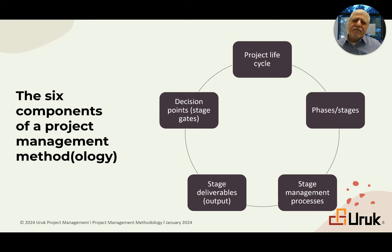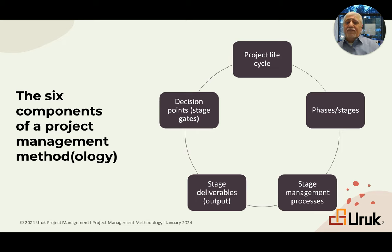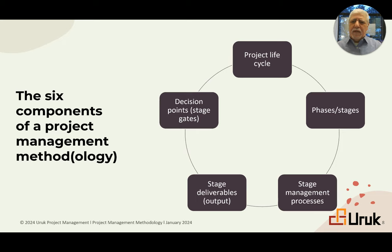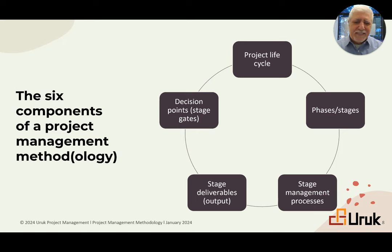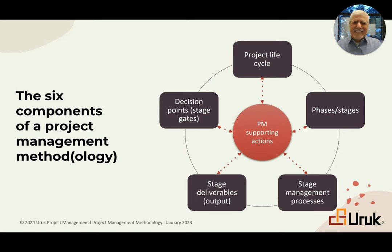Each phase or stage of the life cycle focuses on something specific. Because we break the project life cycle into stages, we need to manage each stage — that's what we call stage management processes. Every stage must then deliver an output: a product or result of that stage. That output must go through a decision point, which we call a stage gate. Those are five of the six components.